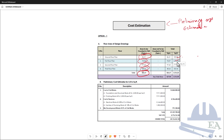Once we have all this area, using a thumb rule you can get the total cost. For example, the cost of civil works — foundation and structural works — is done at 2,250 Nepali rupees per square feet. You take the total square feet area and multiply it by 2,250 to get this value.